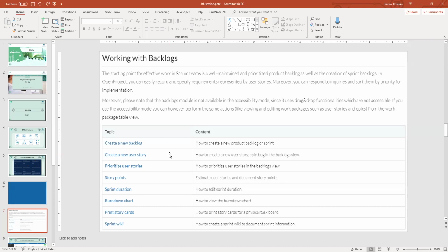This plumber first has to go to the first floor and do the work, then he goes to the second floor and does the same procedure that he did in the first floor. He has to repeat it in the second floor and go on until he finishes all the floors. So this is a scenario that is going to be repeated.